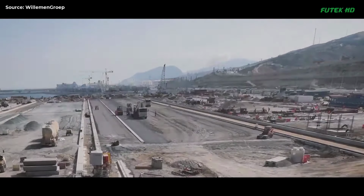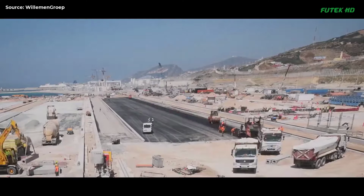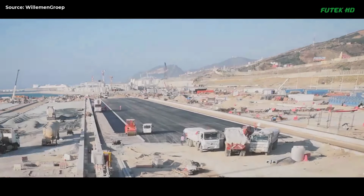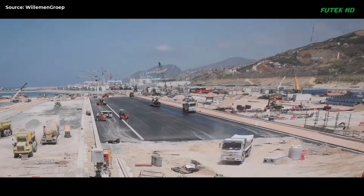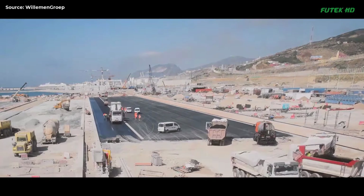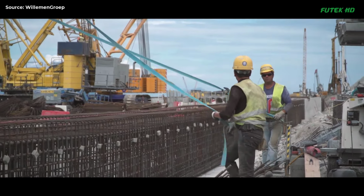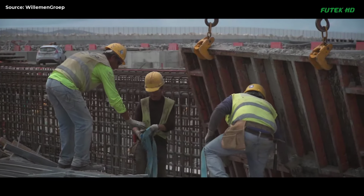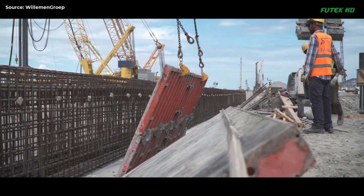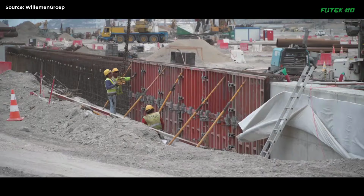The landside trailer beam was connected to and mounted on a row of 414 reinforced concrete foundation piles, each with a diameter of 1.35 meters and a length of 26 meters. Drilling rigs operated 24/7 to drill and excavate boreholes up to 7.5 meters into the underground bedrock. Every delivery from the batching plants was checked for consistency, and an independent control agency with an on-site laboratory controlled the quality of all processed concrete.